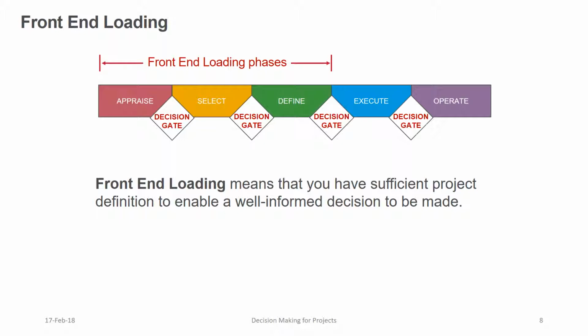You should not move into the next phase of the project until you've completed the current one to a level of definition which is sufficient to make an informed decision. It does not mean that you need to know every detail so that there are no uncertainties, but rather the level of uncertainty is appropriate for what is required for that particular decision.